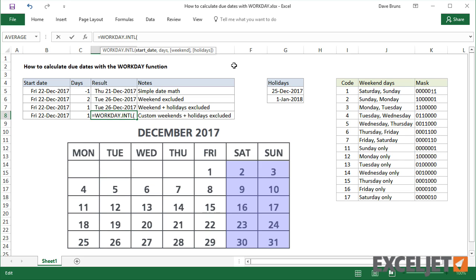WorkdayINTL takes another optional argument, called Weekend, which goes into the third position, followed by holidays.